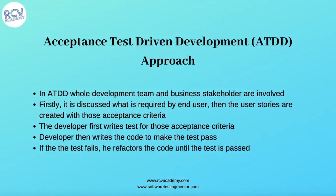Those requirements are defined as the acceptance criteria within the user stories. The developer then first writes tests for those acceptance criteria. In ATDD, during the definition of the story itself, the developer and tester or the whole team defines and writes the test cases for the acceptance criteria. Once the test cases are written, the developer writes code to make those test cases pass.